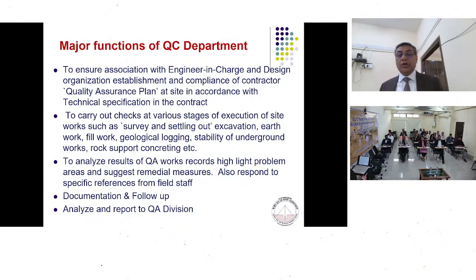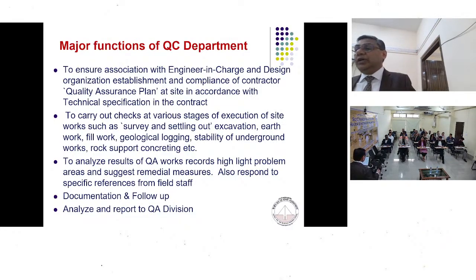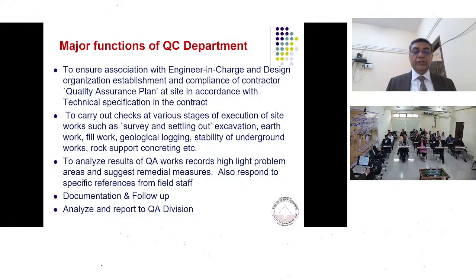To analyze results of QA works, records, highlight problem areas, and suggest remedial measures. Sometimes as a QA team, you alone may not be in a position to suggest the remedial measures. Then you have to work in tandem with the designers. You have to bring the problems to the knowledge of the designer, that such and such thing is happening and requires certain design intervention, or certain correction in the construction procedure, or certain deployment of additional machinery or manpower. So all that has to be done by you. Then documentation and follow up, analyze and report to the QA division.